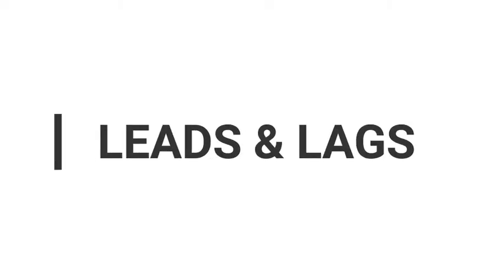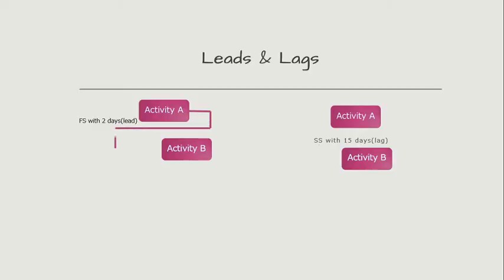Leads and lags. A successor activity is said to have a lead when it can start before the predecessor activity has completed, or the lead can be defined as the amount of time a successor activity can be advanced with respect to a predecessor activity. In this example, activity B can start before the early completion of activity A.